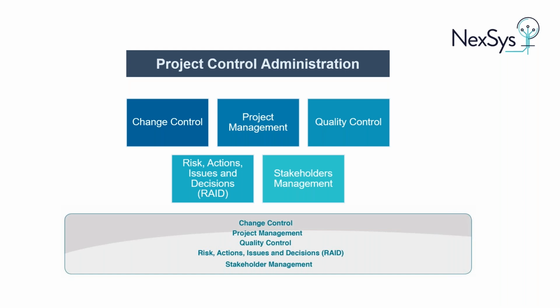The project manager is responsible for signing off changes within the project tolerances. Changes outside the agreed project tolerances will require the approval of the project sponsor or project board.